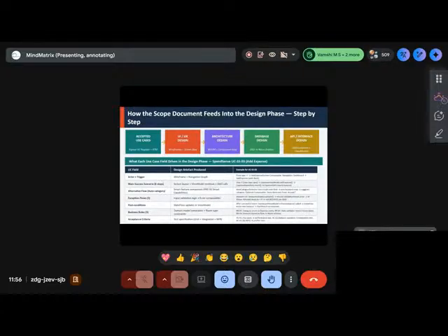And please understand that the design phase also has to be approved by the technology team of your consumer, in this case your mentor. Get it approved and say, hey, I approve the technology stack in terms of the UI, the architecture, the database, the network security, and various third-party tools. Once you get a sign off and baseline it, you get on to the next phase of execution.